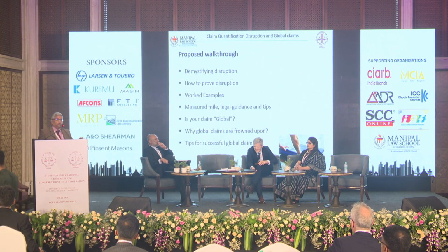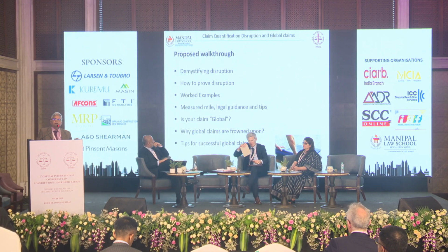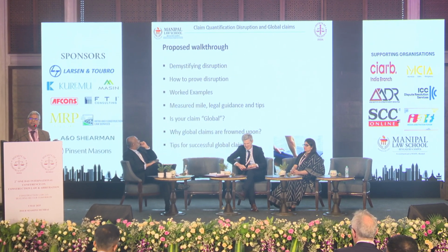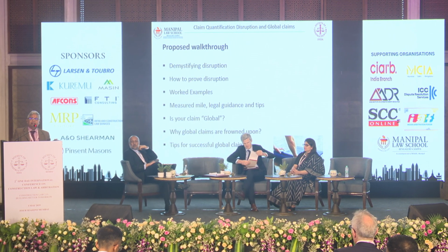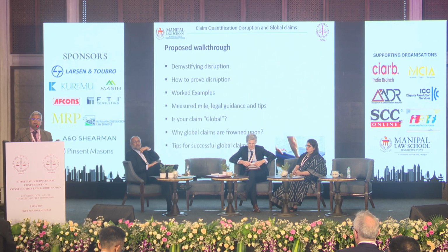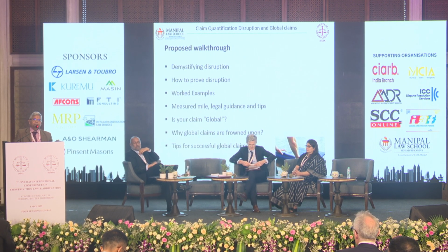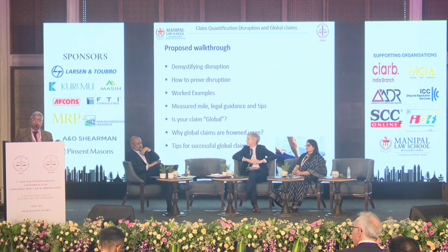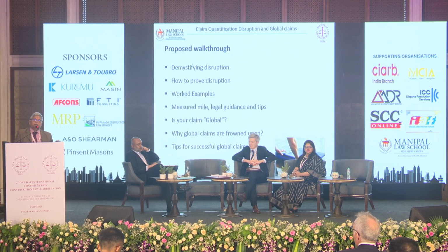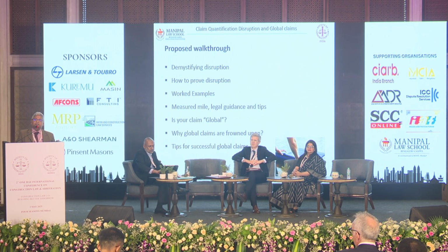There are two things I'm going to talk about. One is disruption. Along with that, something called global claims. Disruption is actually easy to understand as compared to delay, because we are not talking about various delay analysis, concurrency, and all those things. But it is hard to prove. This is my experience as far as disruption is concerned. Generally, there are some legal principles and it's straightforward to look. However, due to the lack of documentation, we find it difficult. So most of the time, the contractors try to resort to a procedure called global claims. We will talk about that and we will take questions on that further.